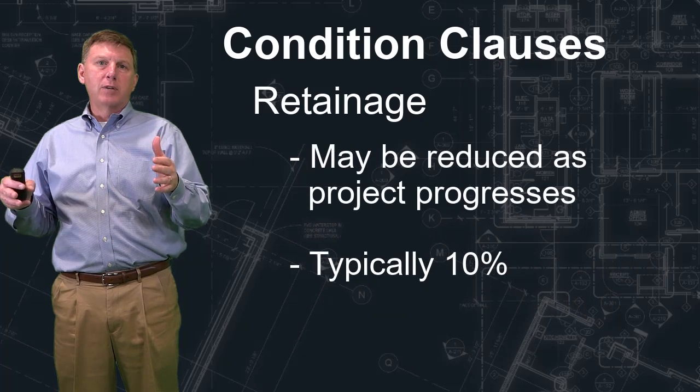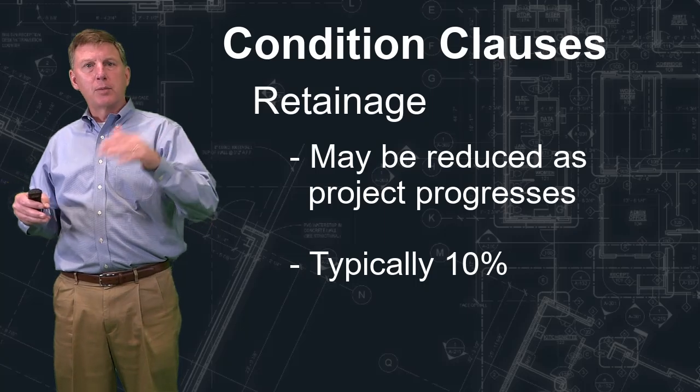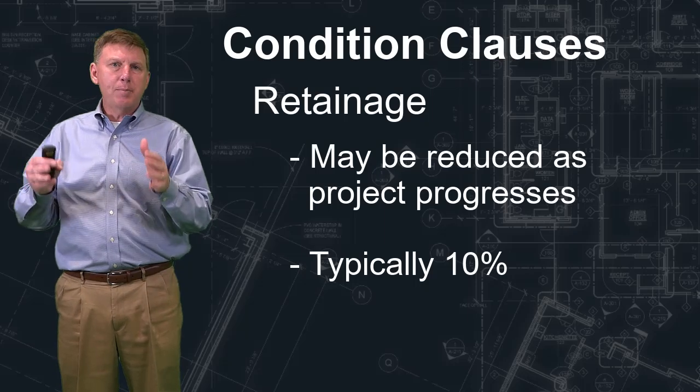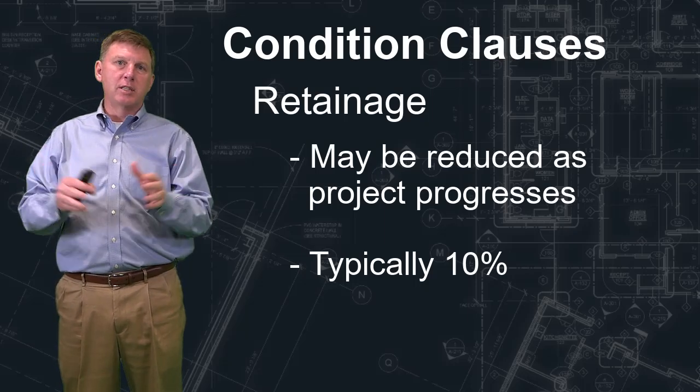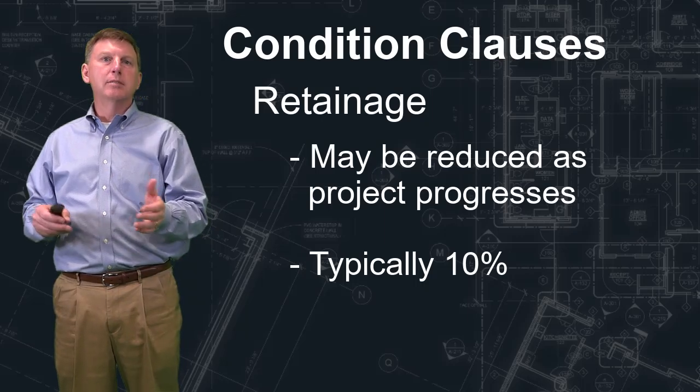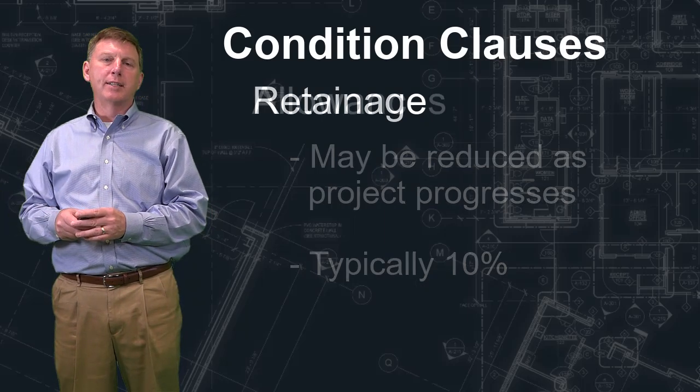Now, I've seen some situations where the retainage is reduced as the project goes along because the owner's risk is lower. But it just depends on the retainage clause within the terms and conditions. It's generally 10% until you get further along in the project.